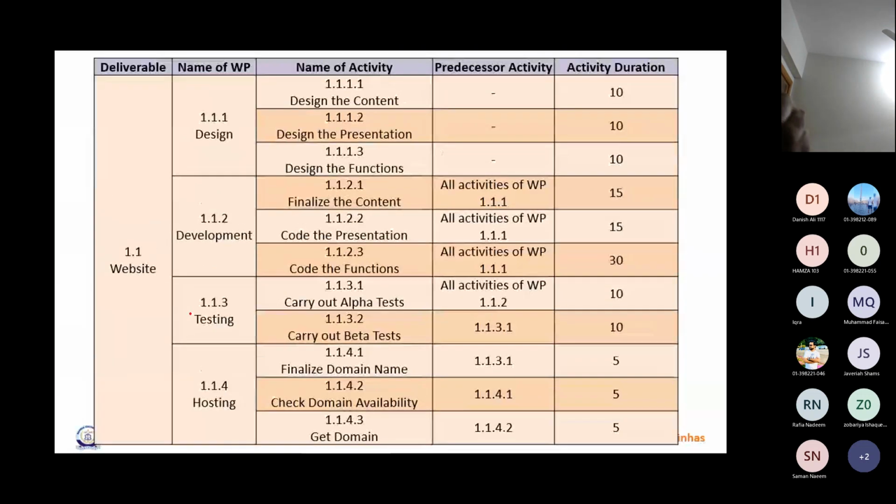And now, what is this? You see, from the work package, what I'm doing? I'm defining the activities, right? So here, this is my work package. First one, the second one, the third, and the fourth one. And this is first activity, 1, 2, and 3. These 3 activities combined together complete this work package, right? And these 3 activities combined together complete this work package. These 2 activities combined together complete this, and so on. Schedule now, scheduling. Yeah, I have entered the schedule.